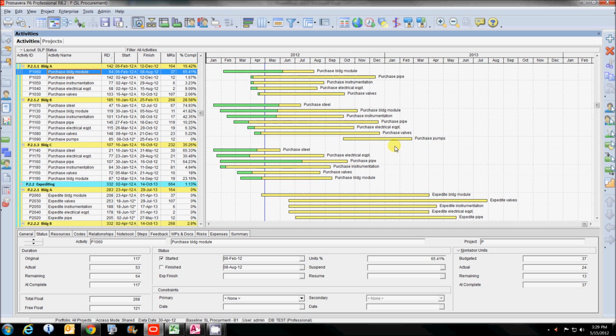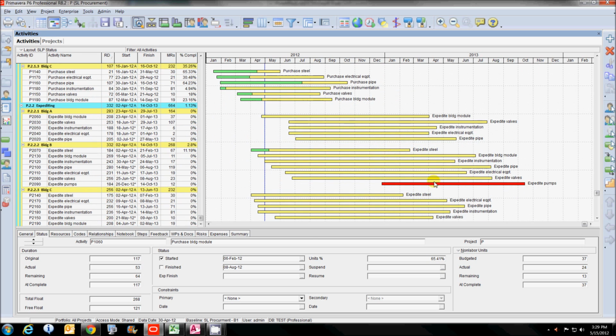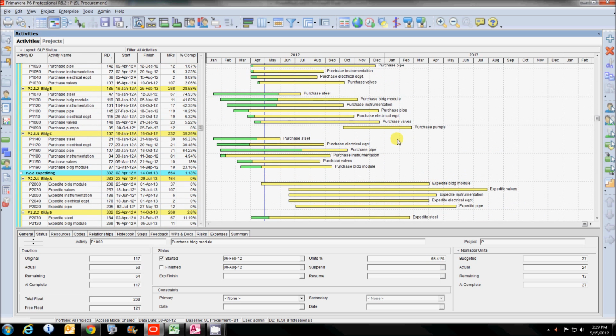And I know that I have a problem here with my pumps, because what we did is we changed the spec on this, and that threw everything off. So the engineers had to go back, and actually I believe it went all the way back to process. Process had to come up with some new materials of construction, and that is going to be a problem. And we know that, and this will be the workaround, but it's representing kind of what we know is the case.